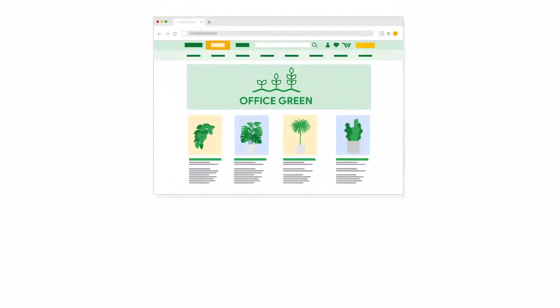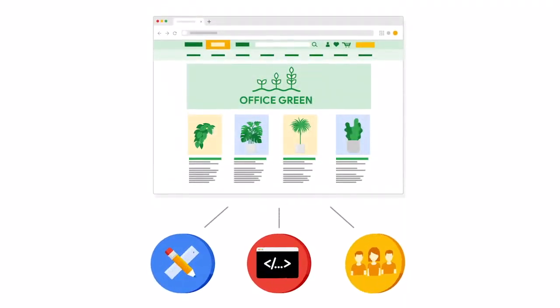In your plan, you need to break this information down further. You're creating a new website for this service, so you'll need to break that deliverable down into smaller milestones, like kicking off a meeting with the web developer and gaining stakeholder approval. And those milestones will break down into smaller tasks, like mocking up a design of the new website and developing a landing page. Each of these tasks will be assigned to a teammate and given a start and end date.